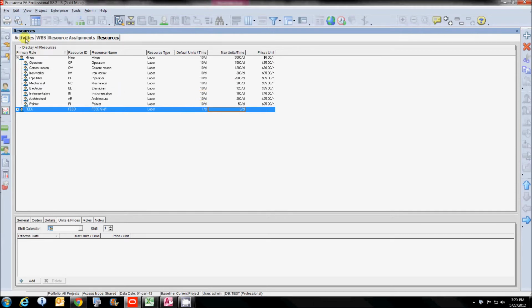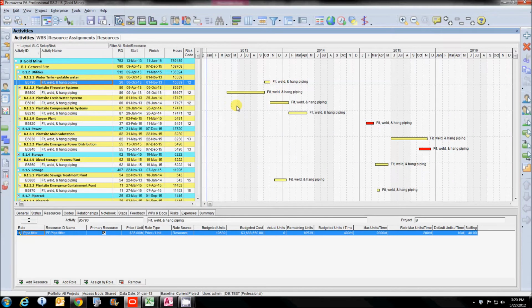So that's what you see, and this is just showing you how we're close to that. In this particular case, I said we're going to have 40 guys doing this particular activity for approximately 26 days. I did this through for all of the piping activities.